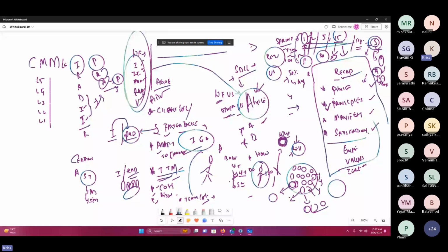PO, product owner, and the scrum team, where we have developers, testers, release management teams, and all other people. So scrum master, product owner, scrum team. All these team members we call the scrum team. This team will vary from 6 to 9 people. The maximum team size should be 6 to 9.